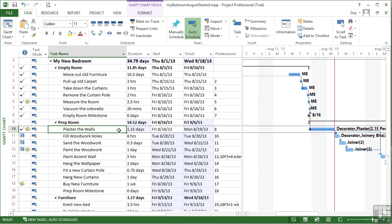And the tasks that follow on from it, so its successors, are all brought to the left. So they're allowed to start a day early than they were, not than their original plan because that's been delayed by this massive task here, but certainly earlier than they were looking until the plasterer managed to recoup a day.